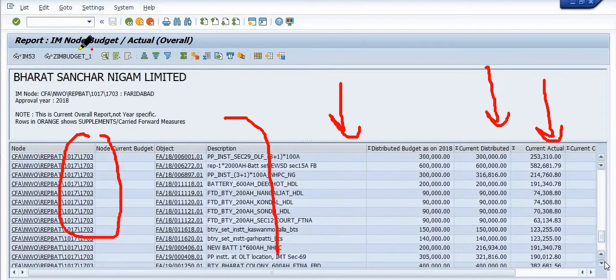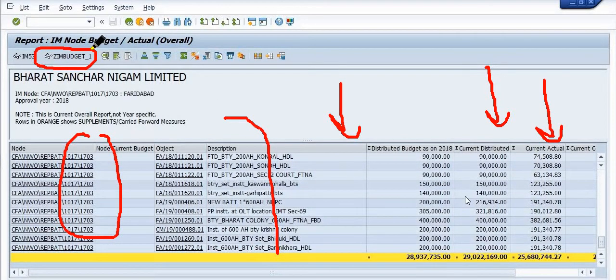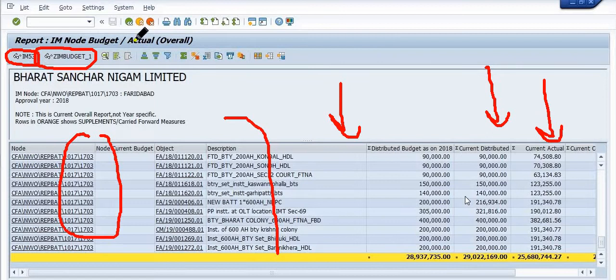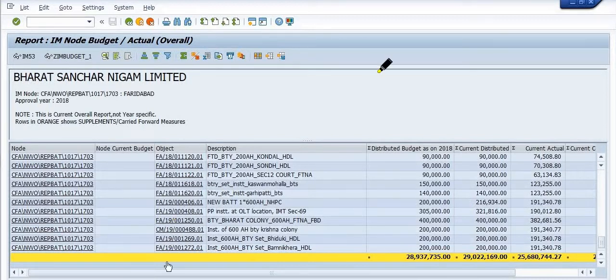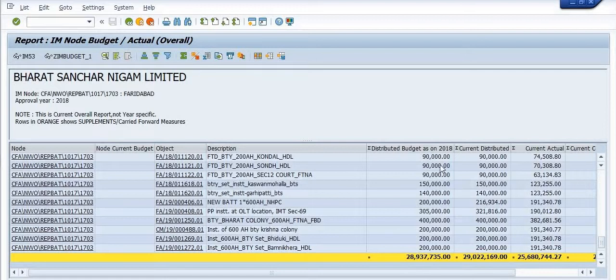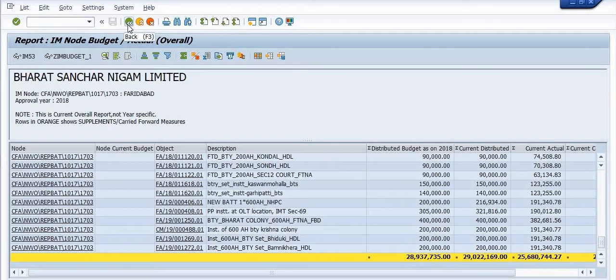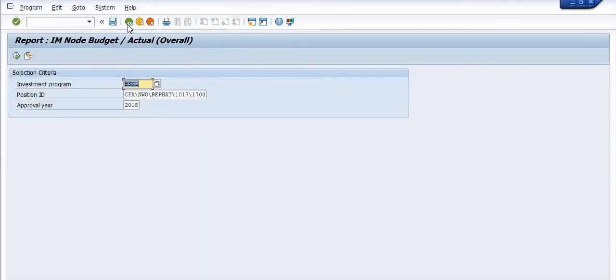For the checking of the budget, we have a transaction code zimbudget_1 for checking the budget in the WBS element. We have this transaction code. So I hope you understand how can we check the data of the WBS element in SAP IM NOT, where is the WBS element.